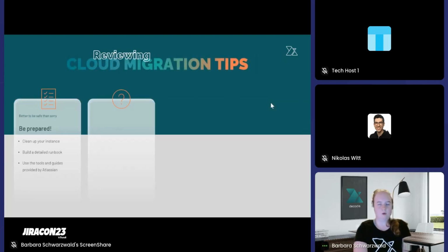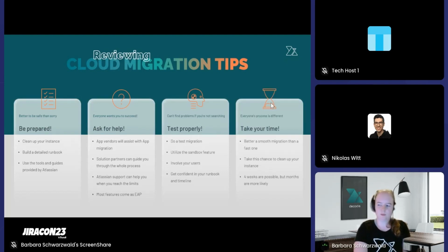So those were the challenges I talked about, but there were also some tips I brought with me to deal with those challenges. The first biggest tip is to be prepared to clean up your instance before the migration so that you have less complicated scenarios and less raw configuration elements to deal with: workflows, custom fields, etc. Any app or anything you can identify before the migration that you do not actually need, you do not have to think about how to migrate. So that will make everything easier.